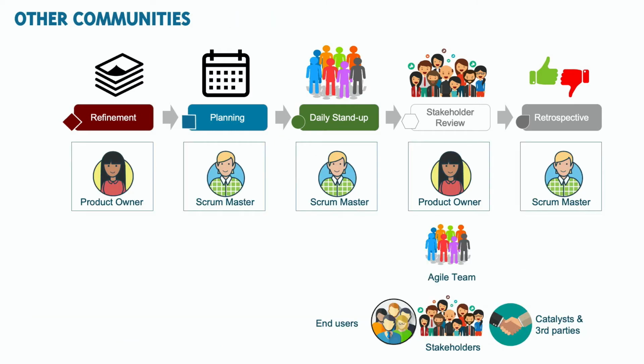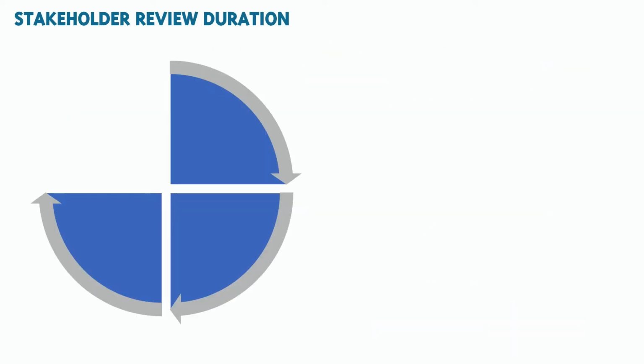Each review should be attended by all the stakeholders, including sponsors, contributors, and consumers. And the invitation should be extended to end users, catalysts, and third parties where appropriate. Typically lasting no more than 45 minutes, consisting of 3 equal sections.